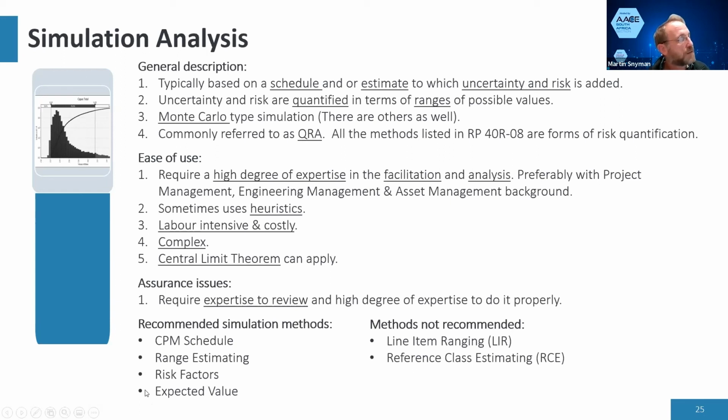This is the one that you see forms of in your handbooks that tell you, take the risk probability, multiply that by the impact. You get a number, which is called an EV number, and you add them up, and you get your contingency. It's the general basis of that, but there's way more than I just explained, because what I just mentioned is the wrong take out from the process.